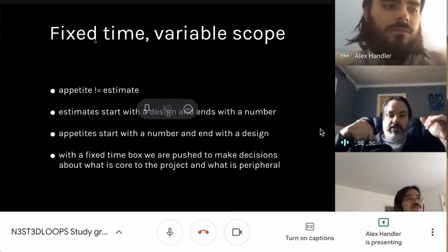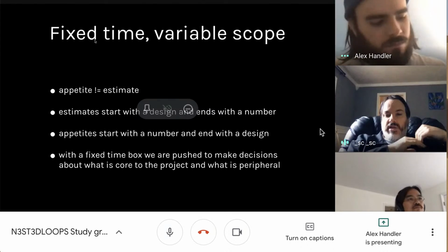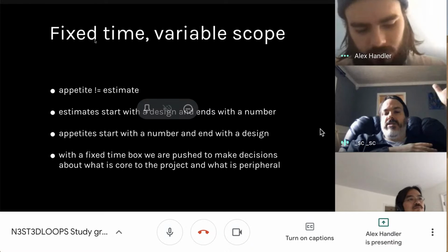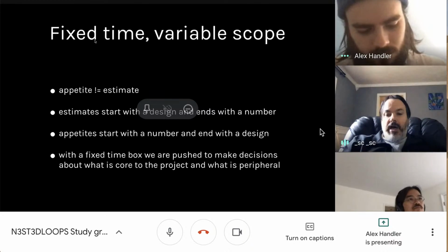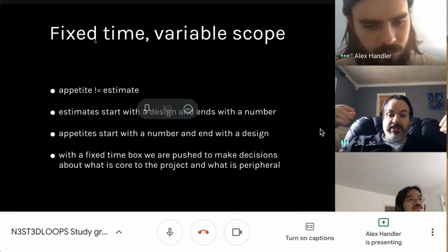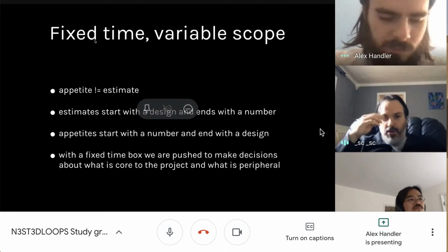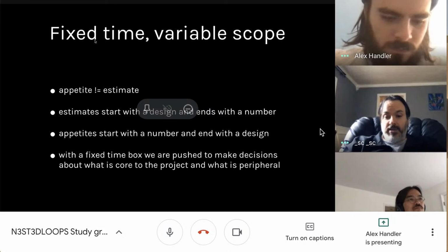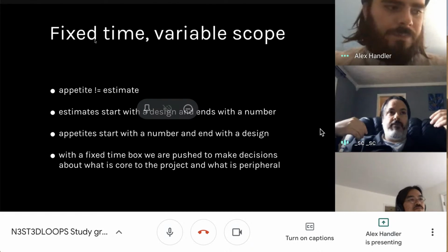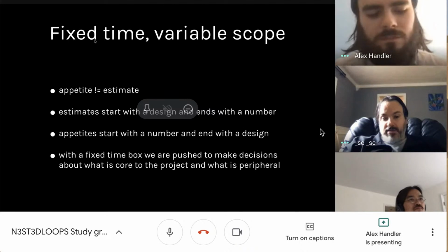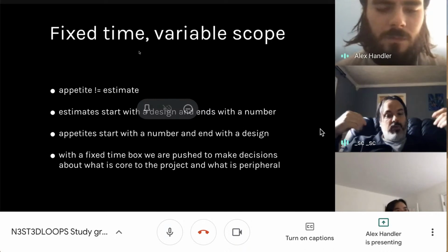Generally with waterfall, people made a lot of decisions up front, told the developers to develop, and 6 months later discovered that's not how the system works, or that what the customer wanted was not those requirements.